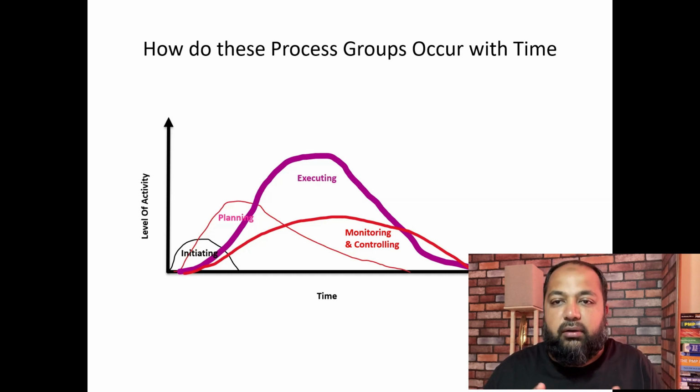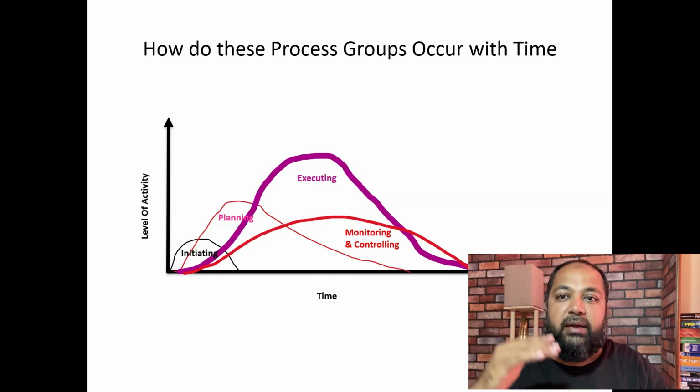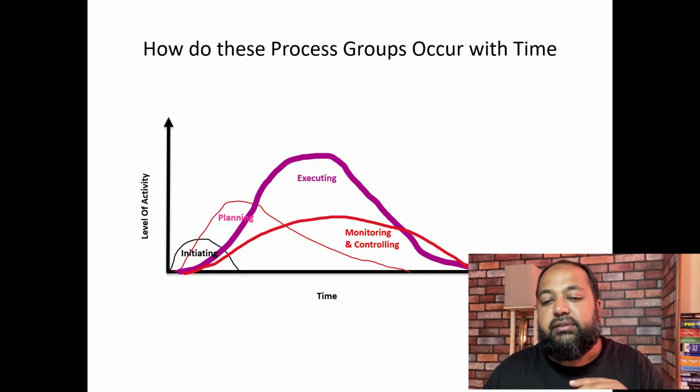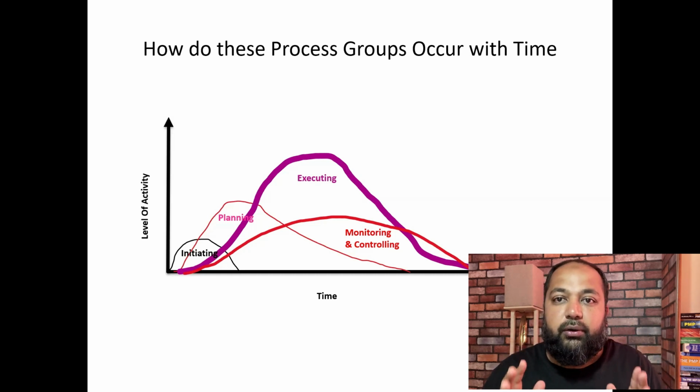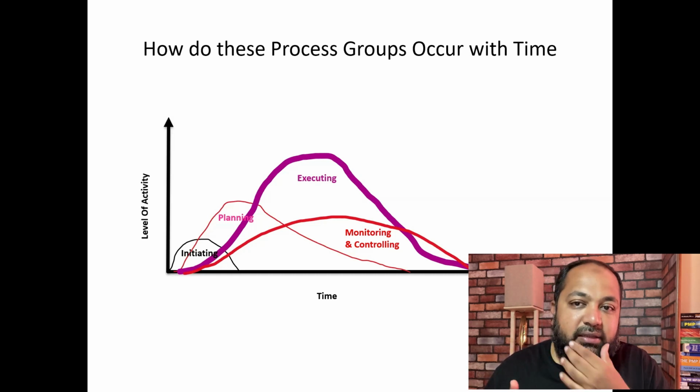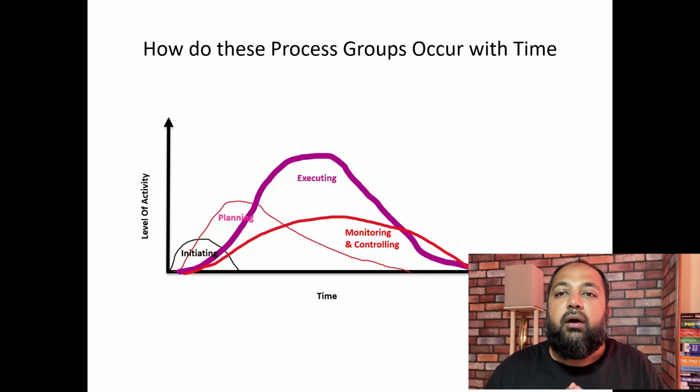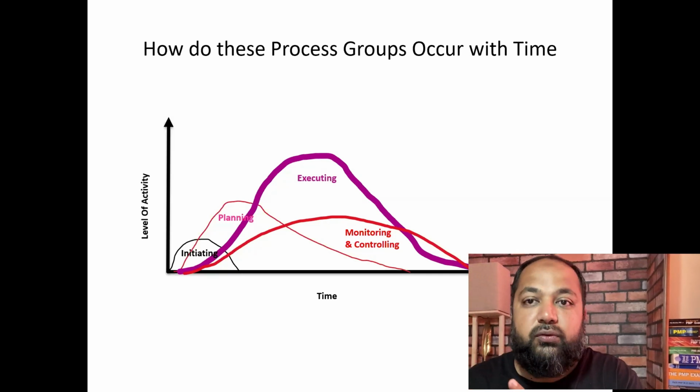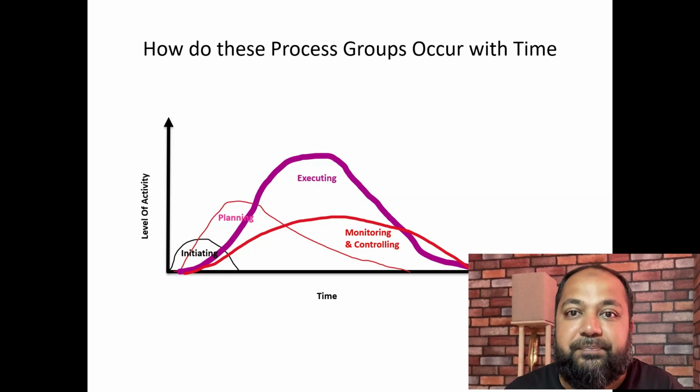So you're controlling, checking the interim deliverables, doing the validations from the QA, so control quality is happening, right? So it happens on the same day. There's an overlap of things happening on the same day. Executing is done, the build is done. Now you want to control, gather data and see, is this fine, or are a lot of defects coming in? Then you prepare the work performance reports from the information, and then take some action on that.